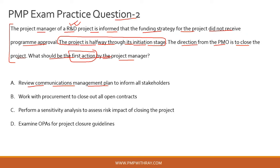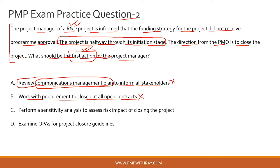Option A: review the communications management plan to inform all stakeholders. This is incorrect. You can communicate during project closure, but is it the first action? Probably not. Also, the communications management plan is not even available at the initiation stage — it's developed in planning. Option B: work with procurement to close out all open contracts. This is outright incorrect because at the initiation stage there are no open contracts — procurement has not been executed yet.